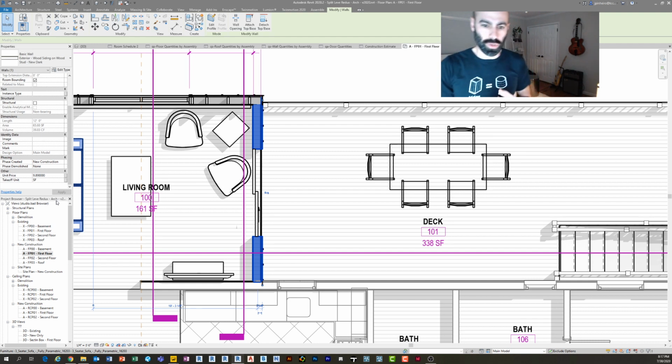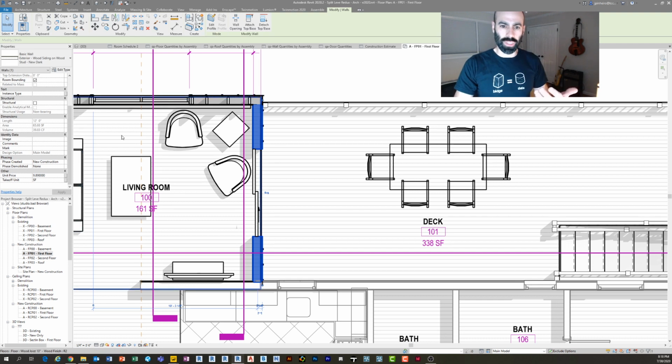And then each, right? So number of doors, number of windows. I wanted to use an instance parameter just because, remember, I'm plugging away and doing all kinds of crazy stuff, so it's easier to select elements and pump in a parameter. So if you look at this, what I'm saying here is this exterior wall construction is $9.89 a square foot. And for anyone who's familiar with pricing, that right now includes the drywall, the studs, the whole assembly of the wall.